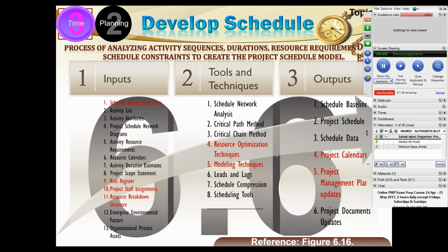If he does not clean the washroom, then ultimately the whole critical path will be disturbed and our project will be delayed. So no matter how inconsequential or minor that job is, if it is on the critical path, this is the most important job. There cannot be a more important job on another path than the critical path.